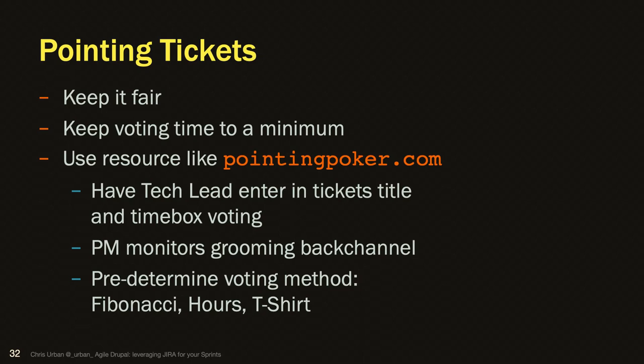Well, then how are you planning what's going in your sprints to know what you can fit? So you do need to do planning. You should do grooming before you do planning. So you have to write the ticket, make sure that you have all the information that is needed. The developer can take the ticket and go with it. They don't have to ask anybody any questions. They can just take it and go, right? That's the idea. Ticket has to be ready to go.